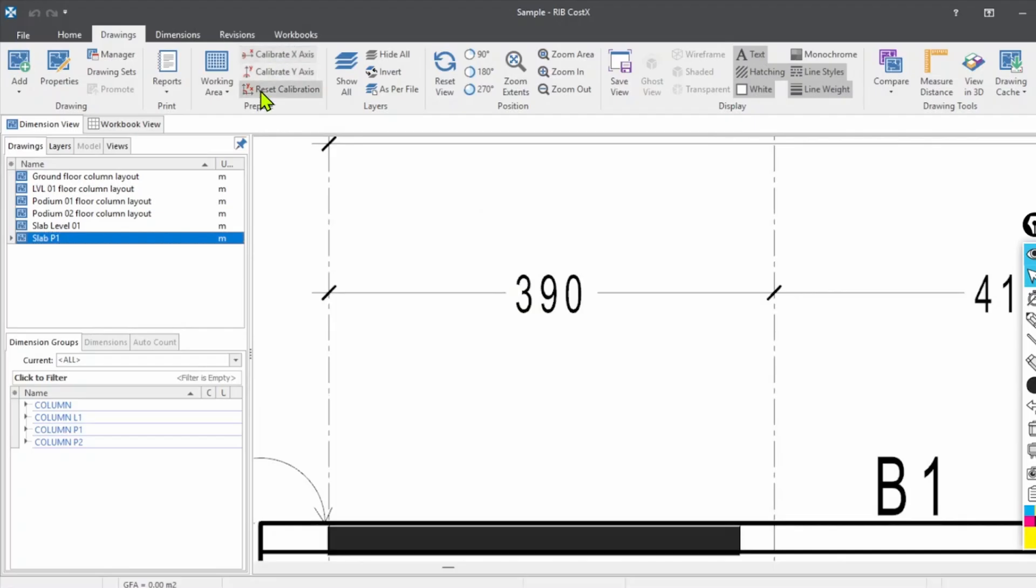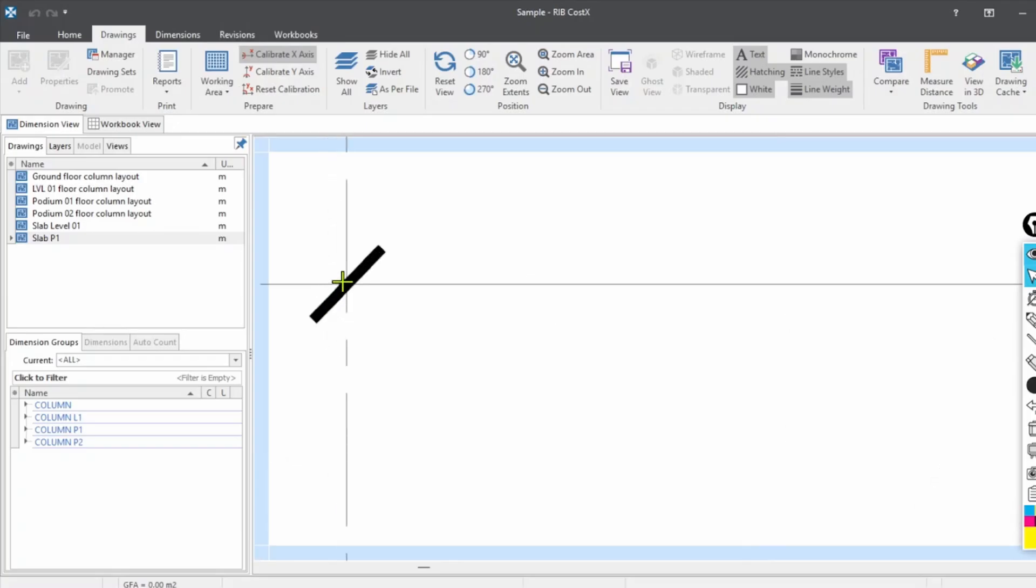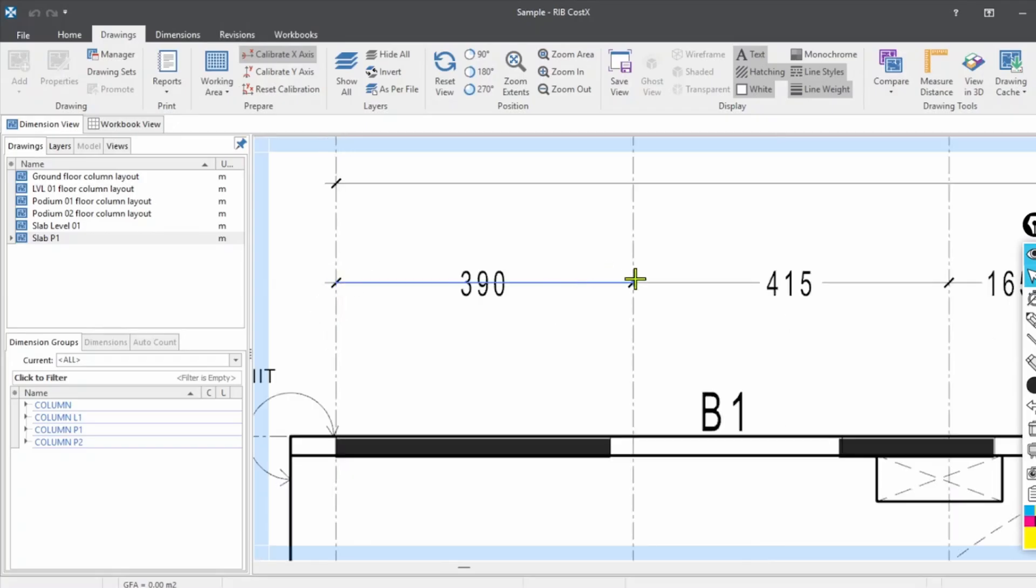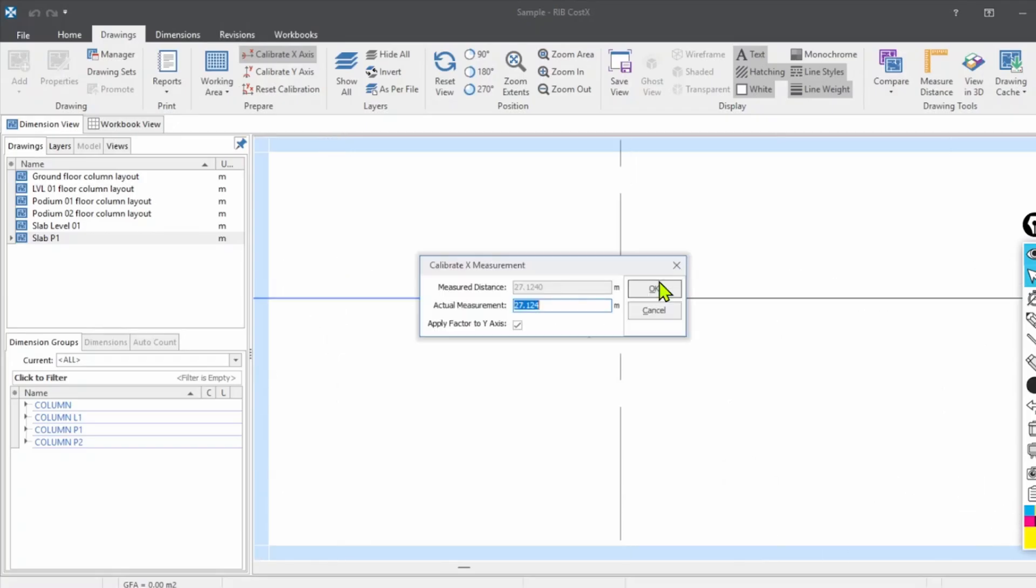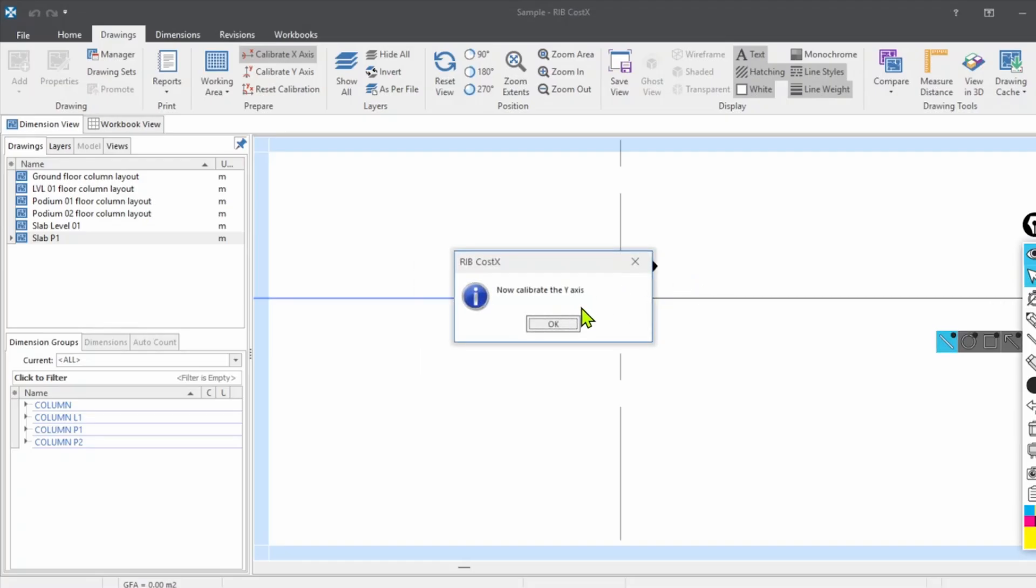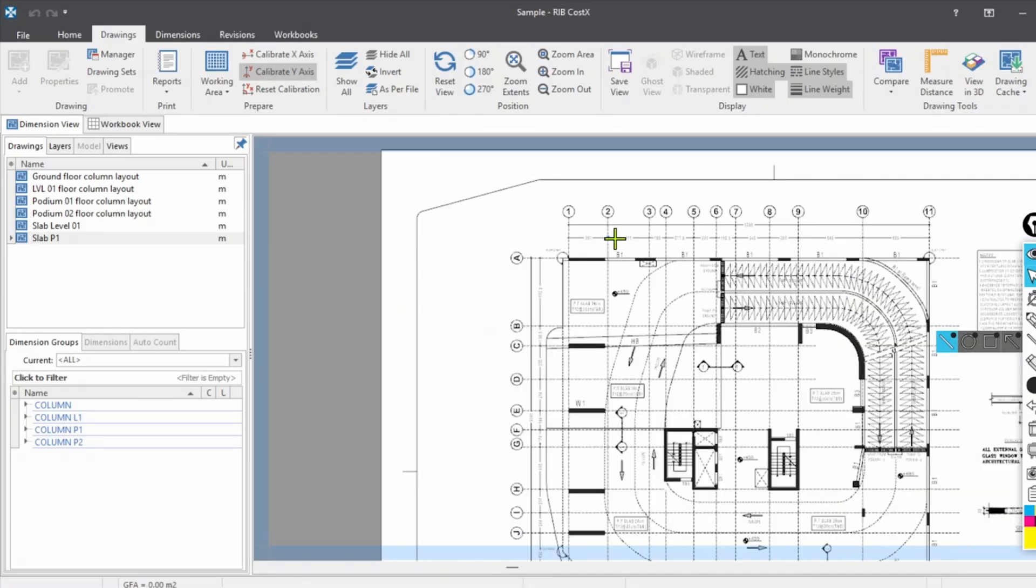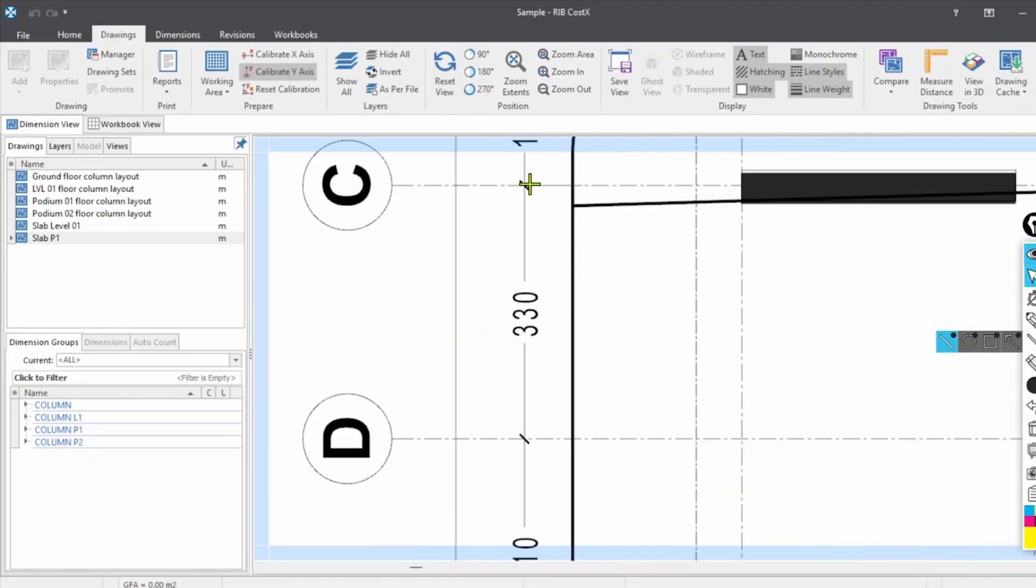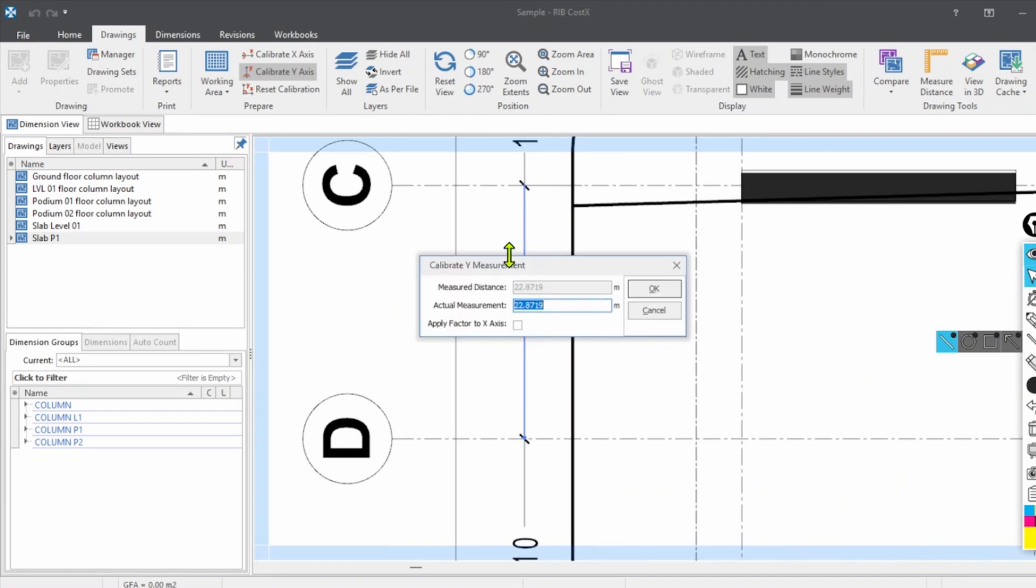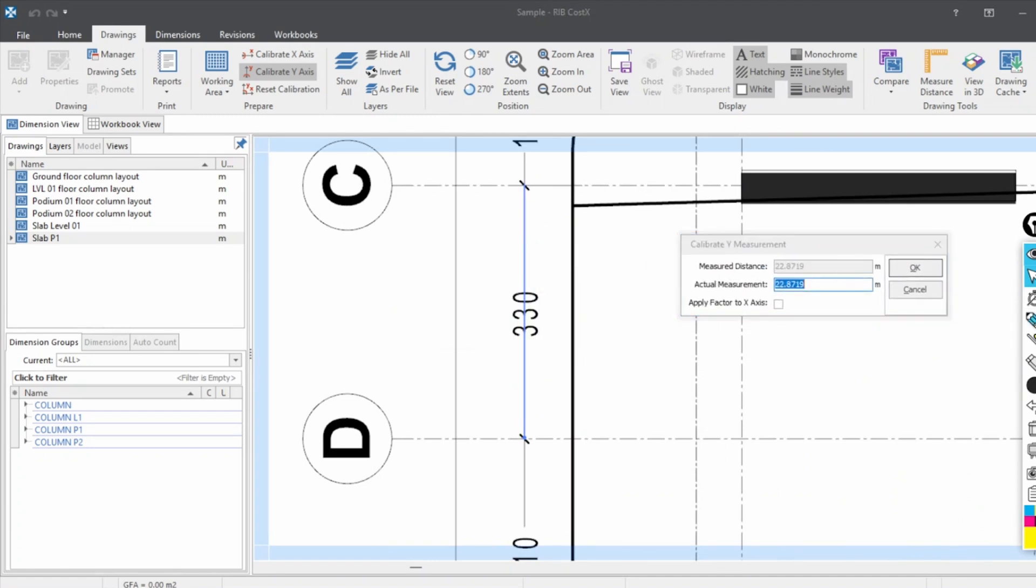Before starting the markup, let's scale the drawing. To scale the drawing, go to Drawings, click Calibrate X-axis. You have to keep in mind you have to calibrate X as well as the Y-axis. Click here, calibrate, just click the two points that we're going to take as a reference. Check this box: 3.9 meter, click OK.